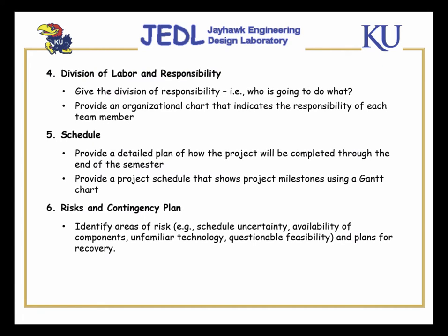And the next thing that you would either describe in your report or show in your presentation is the division of labor and responsibility. In other words, you kind of have done this previously with your proposal. Give that division of responsibility. You should know more about it now. It's been a couple of weeks since you started this. So who's going to do what? Provide an organizational chart that indicates the responsibility of each team member, so the management can look at this organizational chart and see who is responsible for each part of this project.